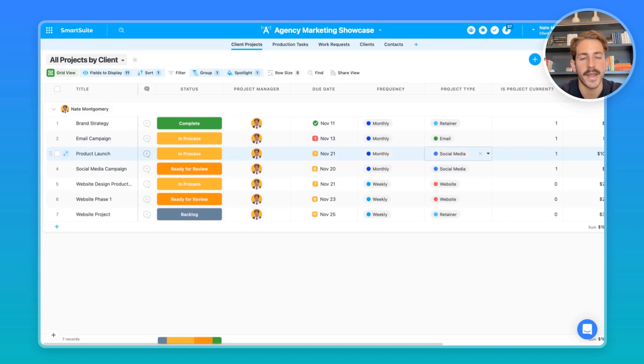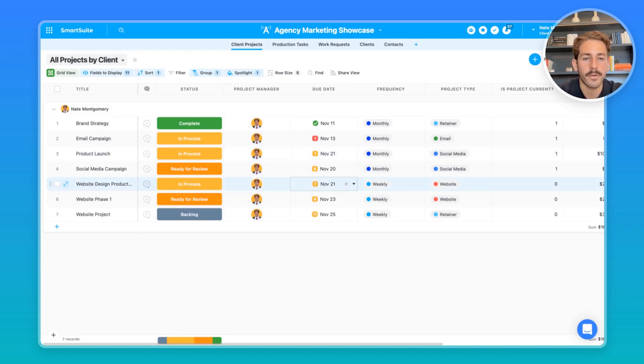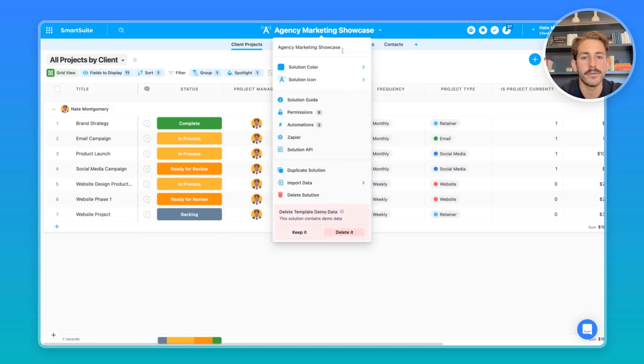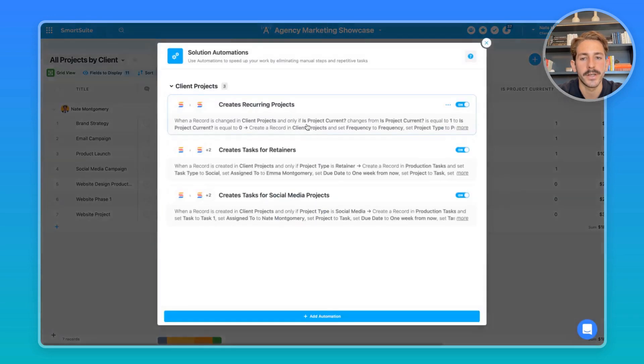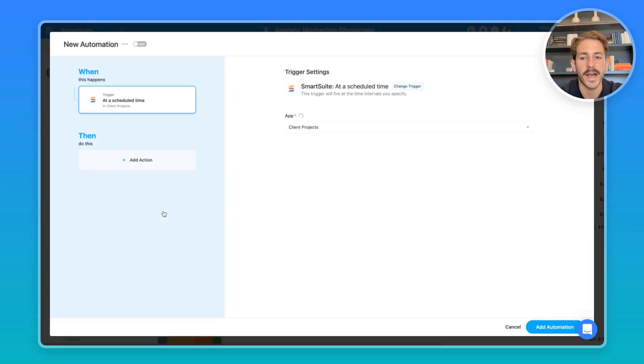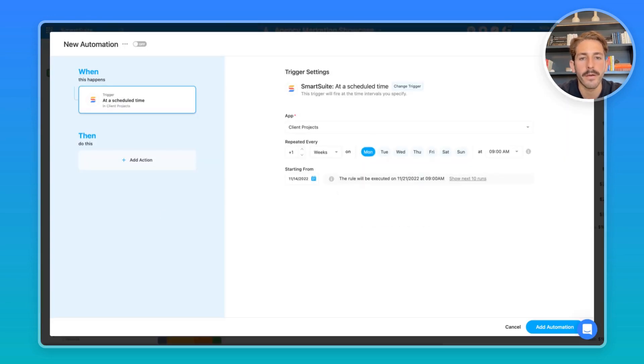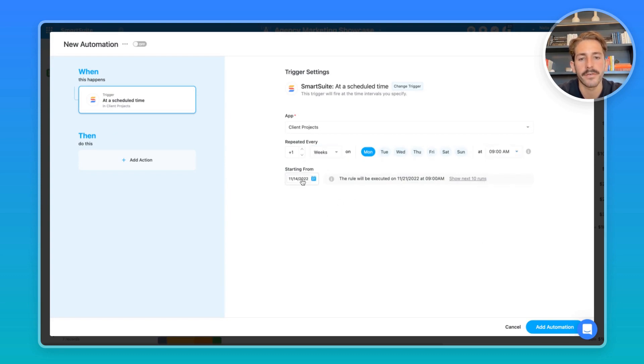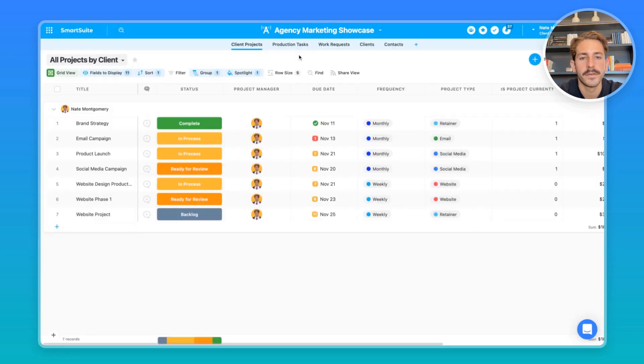That happen at the start of every month or the start of every week. If you did want to create recurring tasks that happen in the middle of the week or happen in the middle of the month, I would recommend you check out the add a scheduled time trigger. That allows you to create recurring projects or tasks on a set interval, on certain days of the week, at certain times, and starting from a certain date.